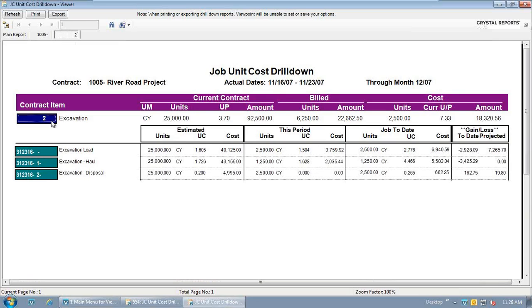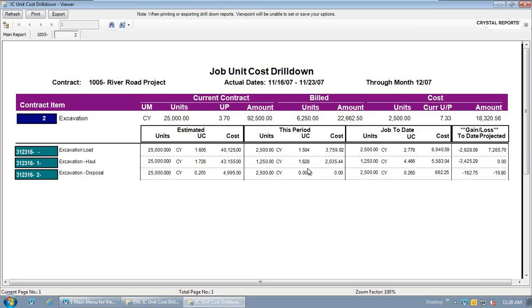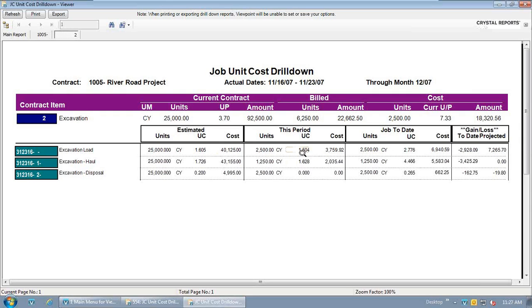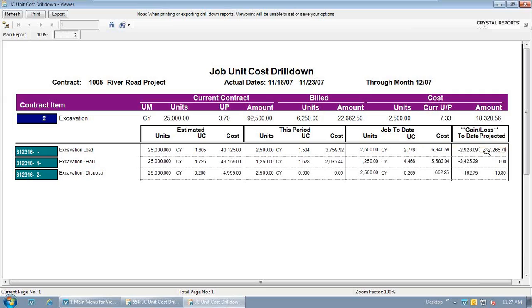And then as I drill into that pay item, now I'm seeing those cost code breakdown showing up for me, and now I can compare my unit cost estimate for each of those activities to what it is for the period I've run the report or for this week, what it is job to date. So I can tell we're still well behind on our estimate at $1.05 for this week. So we're not quite catching up. So we're still well behind on our cost for the job to date here.